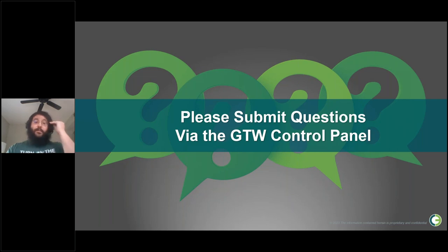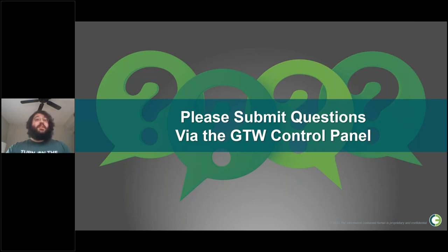Here's another question: how is turnover organized in O3? O3 supports around 10 different work packages, and we do have turnover work packages that have many of the same functionalities as our other work packages. Setting up one work package is relatively similar to setting up all other types — it's really the process, constraints, and approvals that will be different. You can configure your turnover work packages to have whichever status is best aligned with your process, using automatic approvals to create stage gates and constraints up front to make sure everything is ready before those turnover work packages are executed.